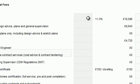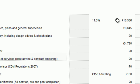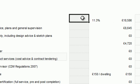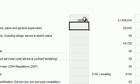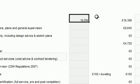The model suggests a figure for project management and this will change according to the types of properties chosen and the levels of finish — a small property will need less project management so the value will be lower, a larger property will need more so the figure goes up. But if we've spoken to a few people, got some quotes, and have a better idea of values, we can just click on these grey boxes and make our own changes. The model will then update itself, replacing the database assumptions with your own figures.